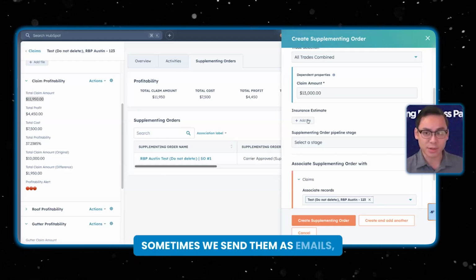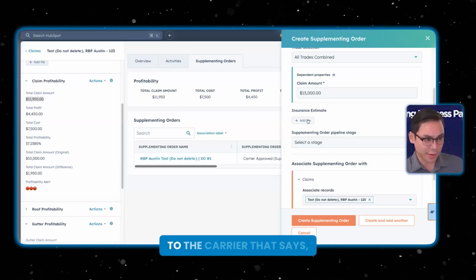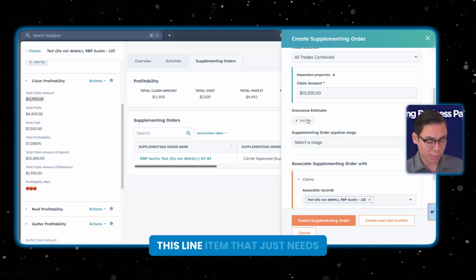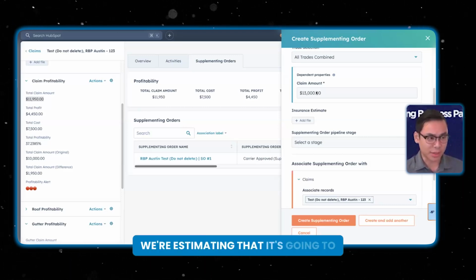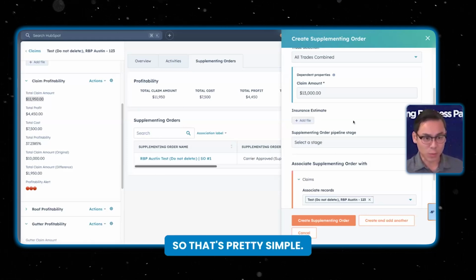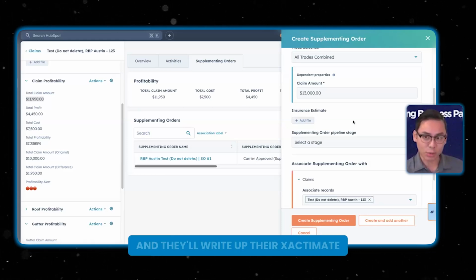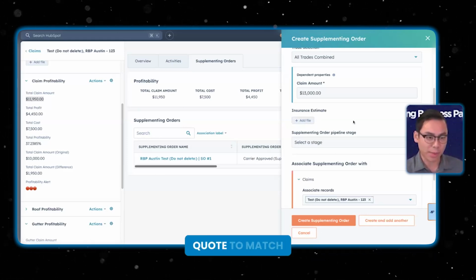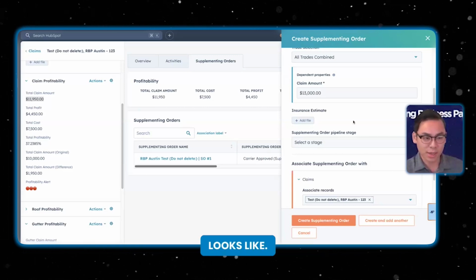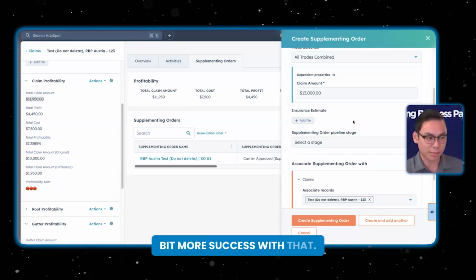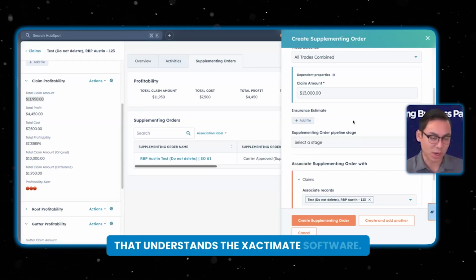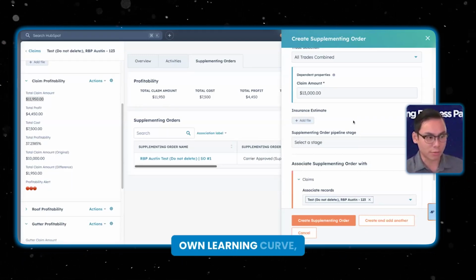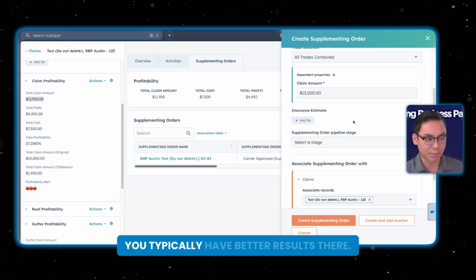Sometimes we send them as emails, and it's just a simple email to the carrier that says, hey, we've got this line item that just needs to be added. You approved 11,950. We're estimating that it's going to be 13,000. So that's pretty simple. We have others that use Xactimate, and they'll write up their Xactimate quote to match what the insurance estimate looks like. And we usually have a little bit more success with that, but it does take a little bit longer. You have to have someone on staff that understands the Xactimate software. It does come with its own learning curve, but once you get to that point, you typically have better results there.